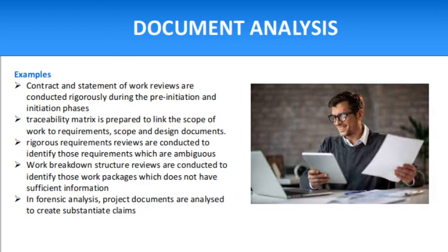Now the examples of document analysis, why we should use document analysis. First thing, for example, there are lots of documents. For example, a contract between two parties is available, a statement of work is available. So we must analyze those documents. For example, the vendor is saying that we can deliver the ABC product in 2 months. Once you analyze the contract with the vendor, you realize that the delivery is required within 1 month, otherwise you can apply a penalty on the vendor. Just take it as an example.